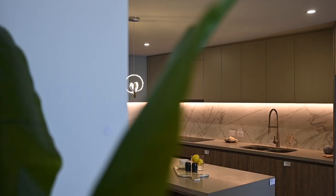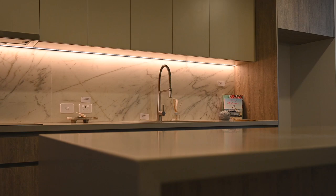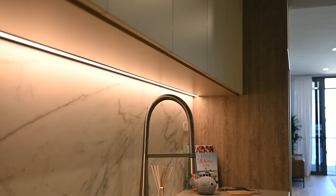We are back here at the Beach Shack inside a completed apartment. I want to focus on the installation of the Eclipse strip. With over 150 apartments, all with integrated cabinet lighting, the electricians were hesitant to place orders for all that custom strip in case it didn't fit perfectly in the cabinetry. Using our production facilities, they were able to measure the installed kitchens and then have custom strip lengths delivered to site 10 days later.